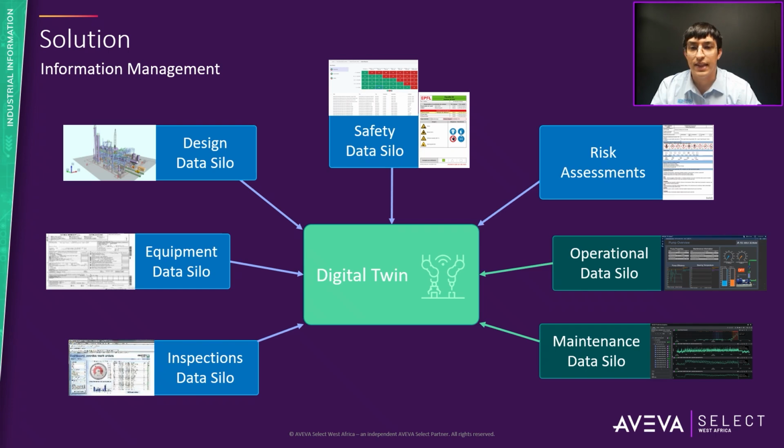Proactively define the data requirements for each project milestone, and progressively validate the quality against compliance, consistency, and completeness as the project progresses. You can also ensure transparency across stakeholders, remove the need for bulky handover at the end of the project, and set the foundation for seamless and timely operations.